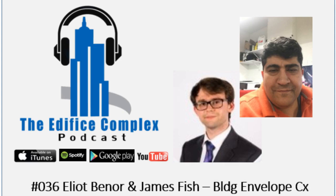So one of the things I want people to leave this podcast with is a real idea of what real value-added building envelope commissioning looks like. Let me tell you what my shtick is when I'm telling people about it. One, if you're hiring any commissioning professional, particularly building envelope, you need to hire them during the design phase. And this is why. Real building envelope commissioning, not LEED building envelope commissioning, looks like this. It's not paperwork. It's input into design details, review of design submittals. It is a factory mock-up and agreeing a systemized approach with all the details. There's an energy modeling aspect to it.